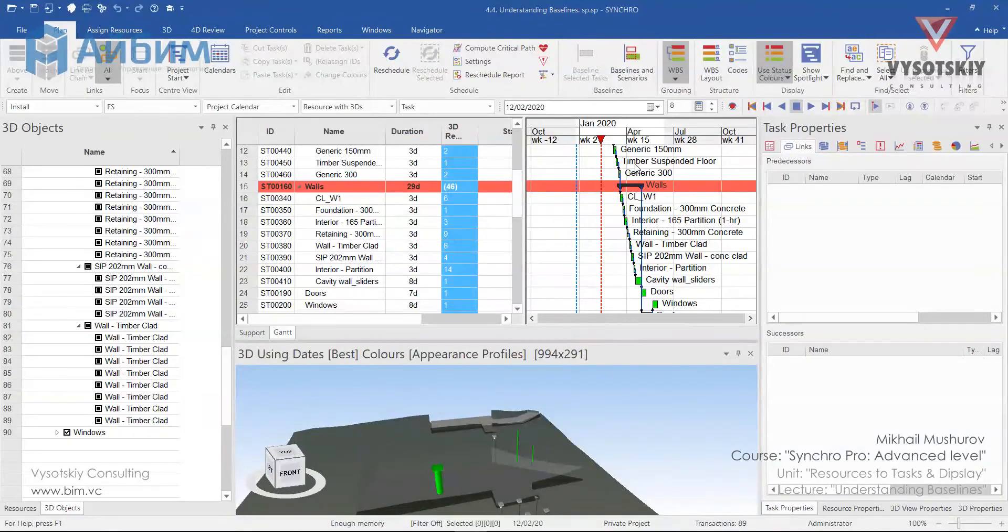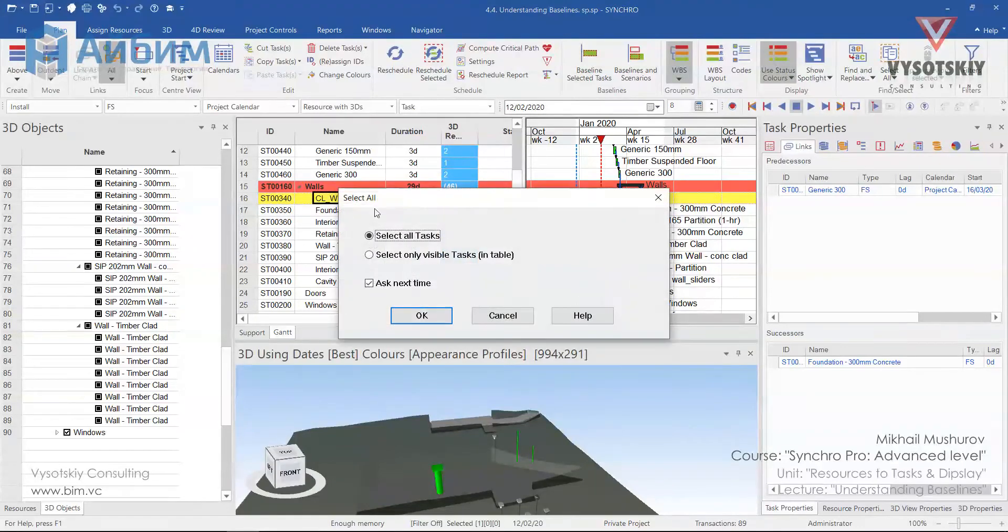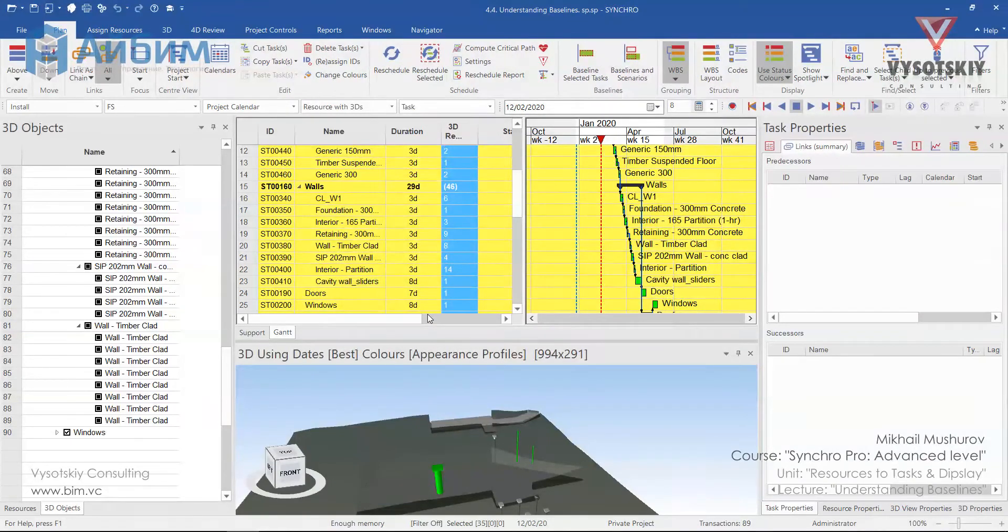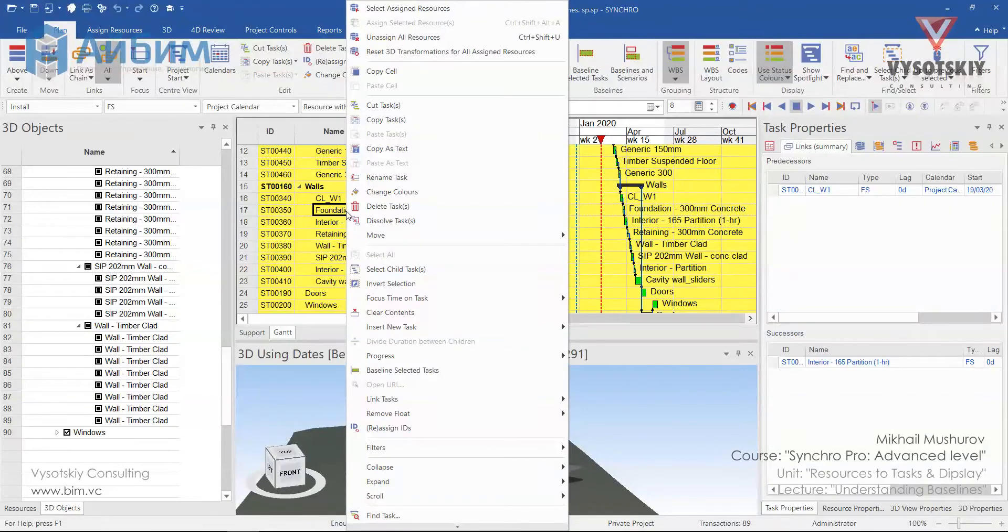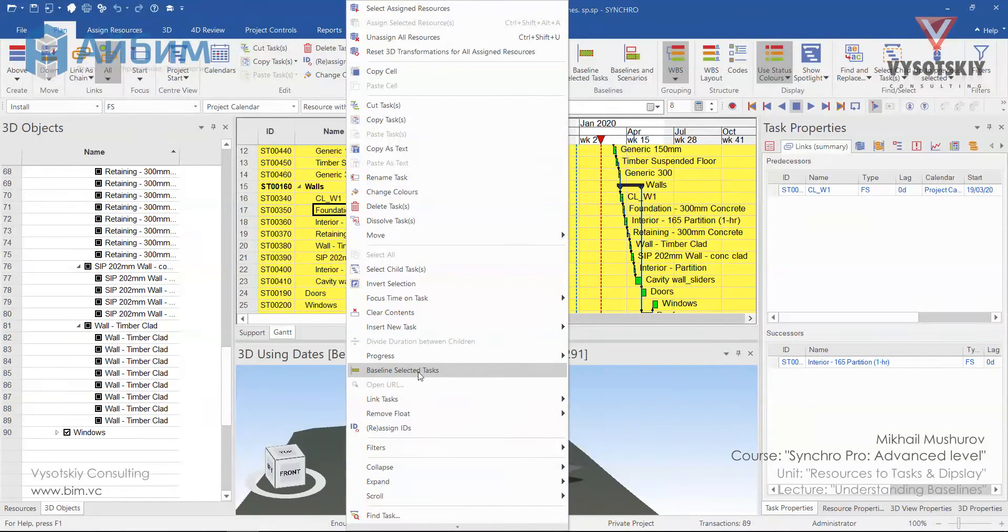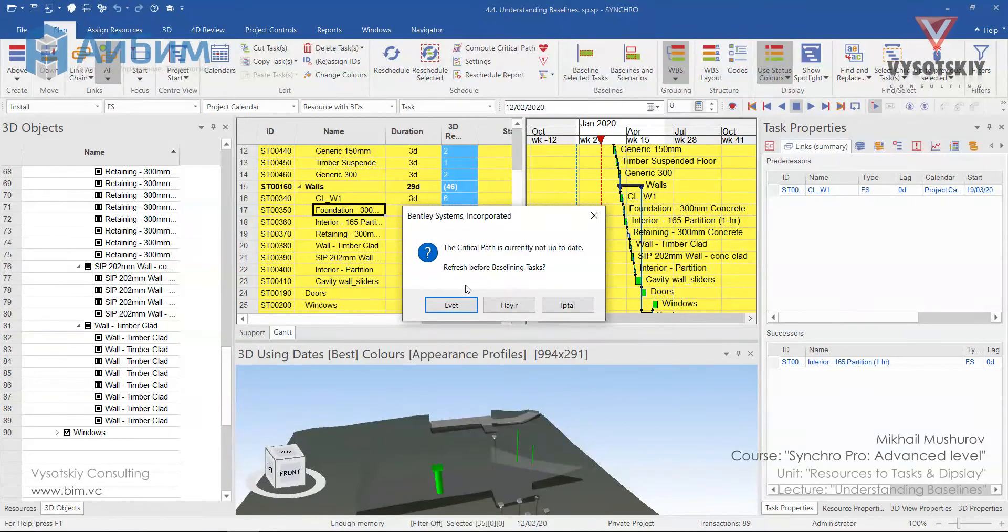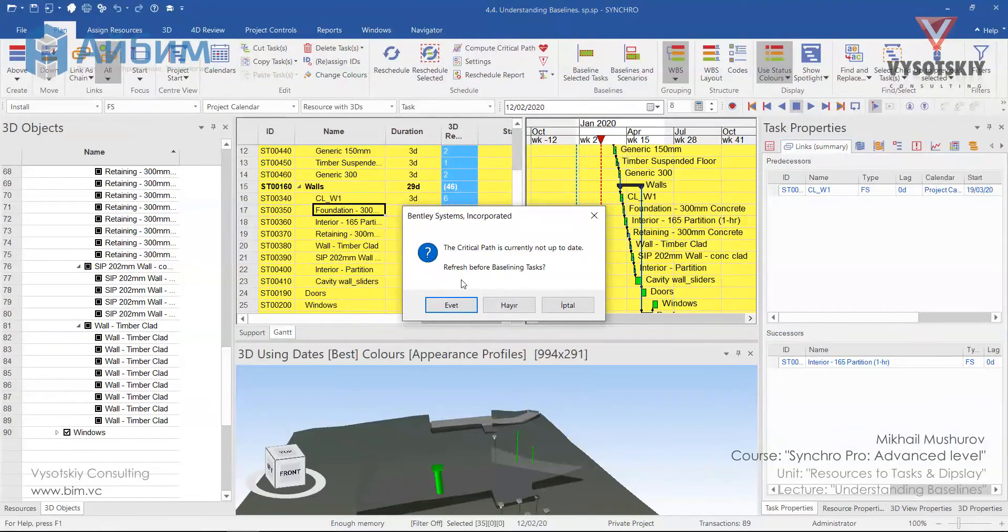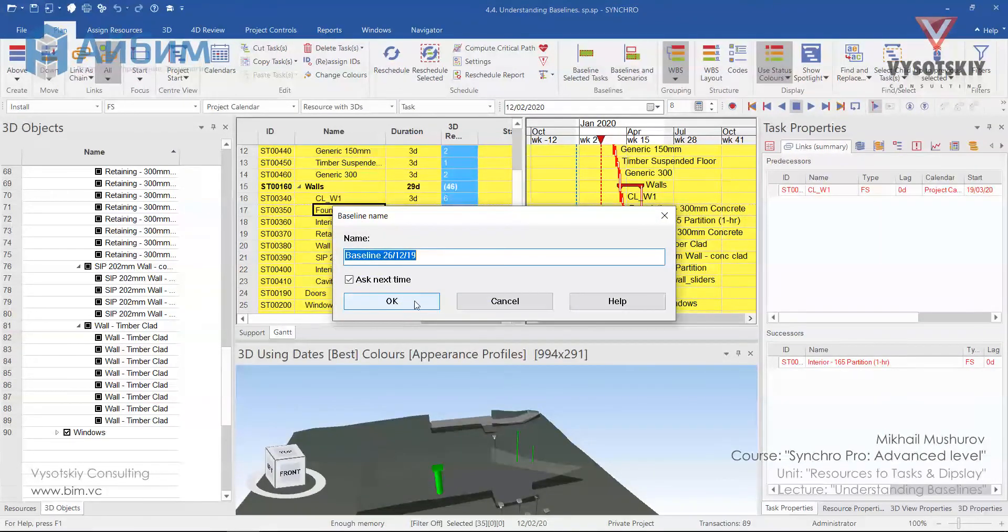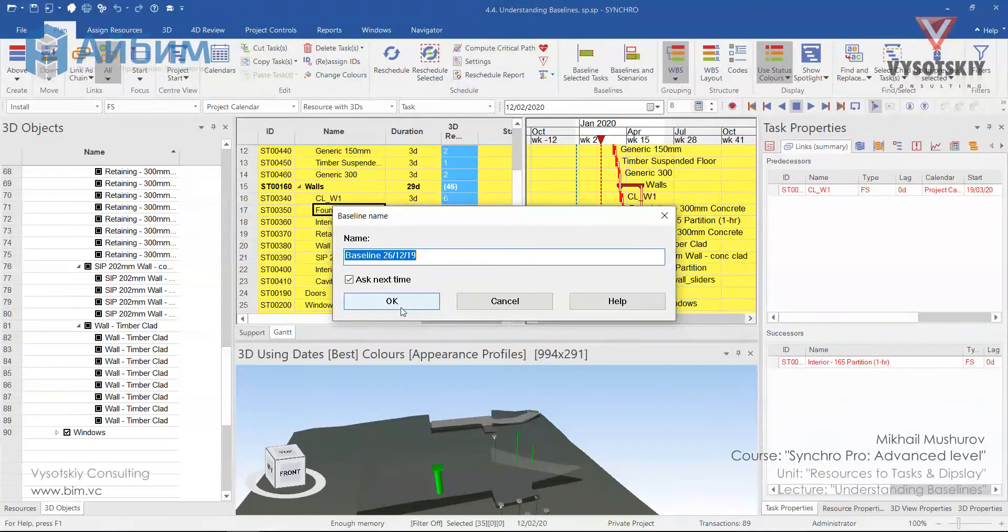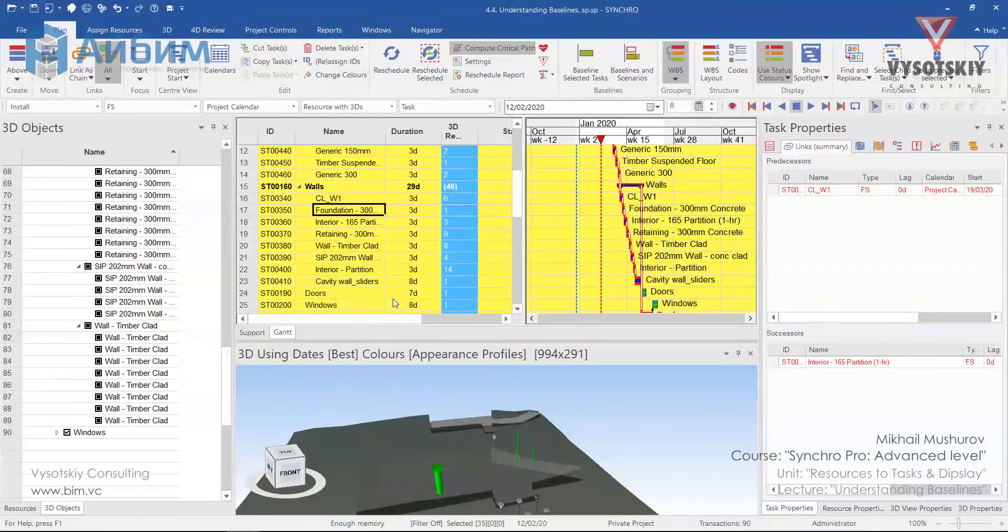In order to create one, select tasks, all tasks or a bunch of them. I'll select all tasks with control A, make a right click over them and select baseline selected tasks. Synchro would notify you that critical path is currently not updated, so we would like to refresh it before baselining these tasks. Click yes and give it a name or leave name as default. I'll leave it as default and OK.